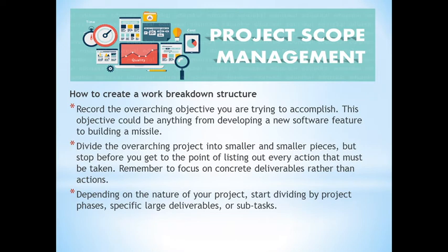To create a WBS, the first step is to record the overarching objective you are trying to accomplish — this could be anything from developing new software to building a missile. Next, divide the overarching project into smaller and smaller pieces, but stop before you get to the point of listing every action that must be taken. Remember to focus on concrete deliverables rather than actions. Depending on the nature of your project, start dividing by project phases or specific large deliverables and subtasks.